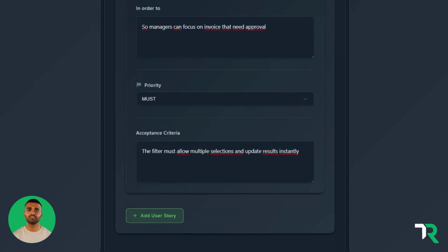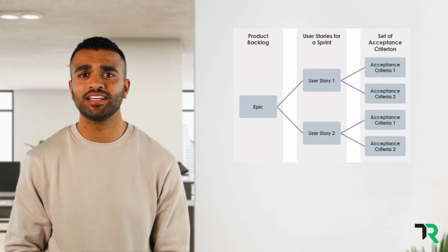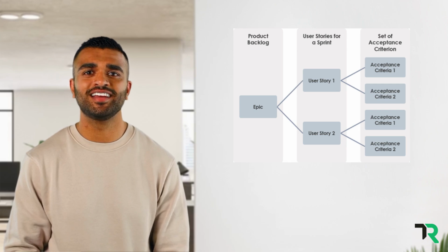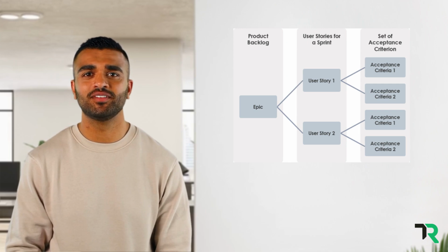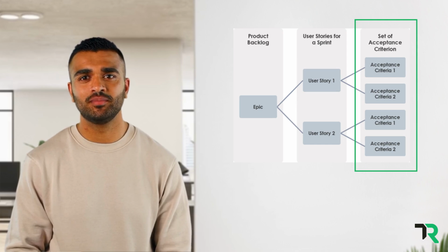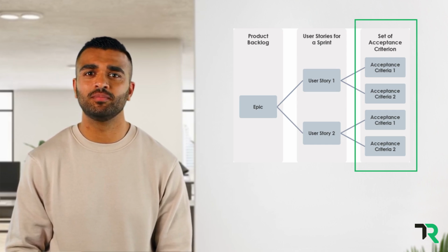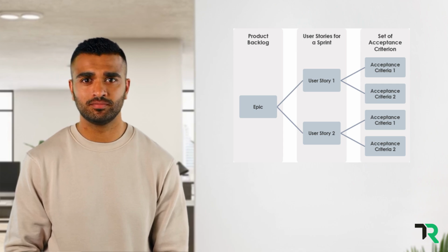Defining user epics and user stories creates the foundation for design. They give developers a clear view of user needs, which can then be translated into application components, tasks, and sprint planning. Here's a tip. Acceptance criteria bridge the gap between user needs and product functionality. By defining clear, testable requirements, you ensure both the team and the users share the same understanding of success. Sometimes it even works best to start with acceptance criteria, because they describe what is crucial to the user for completion. From there, you can work backwards to shape the user story around what truly matters.